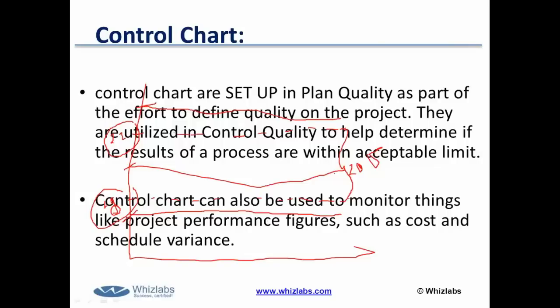That is the customer acceptable range. So a low grade product is a low grade product, but it is accepted, it is fit for use. Okay. So if you are able to access wireless services from that particular product from 16 meters, a customer will accept your product and will probably pay you the full value of your product or services. So specification limits are always above the upper control limit and below the lower control limit. This is also called the customer acceptance limit. 16 to 24 are just example numerical values which I have plotted into this control chart.